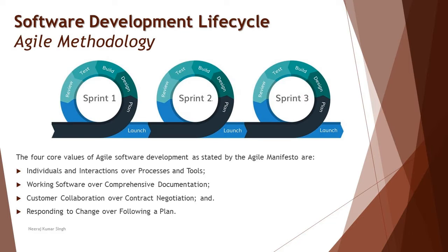In order to understand Agile methodology, let's quickly compare that with the previous sequential models which we have covered. Most importantly, the waterfall and V model are sequential types of models where the event happens once the previous phase is completed. For example, in order to move to the design phase, the requirement has to be completed.